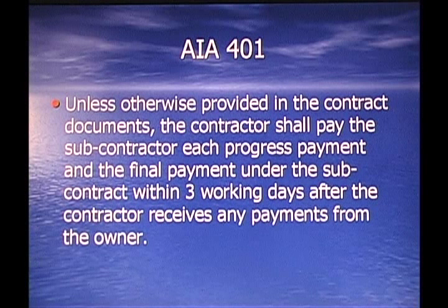Unless otherwise provided in the contract documents, the contractor shall pay the subcontractor each progress payment and the final payment under the subcontract within 3 working days after the contractor receives any payment from the owner.